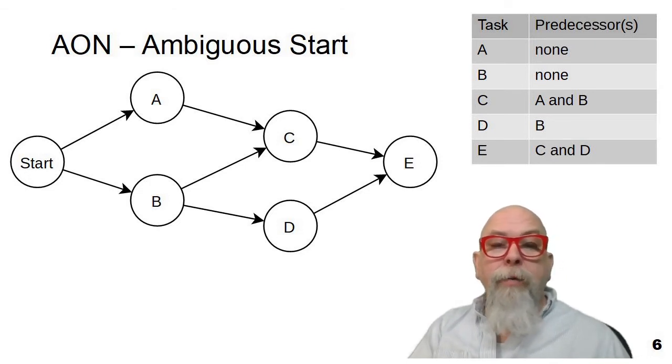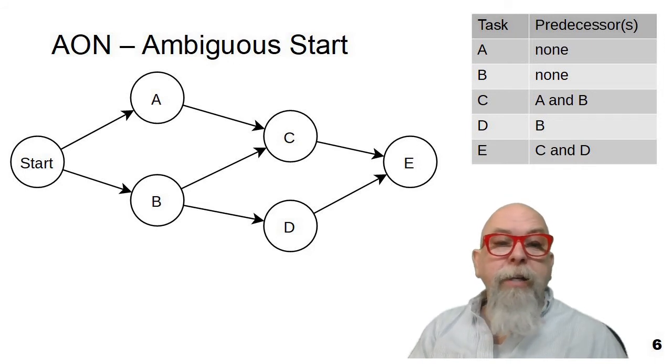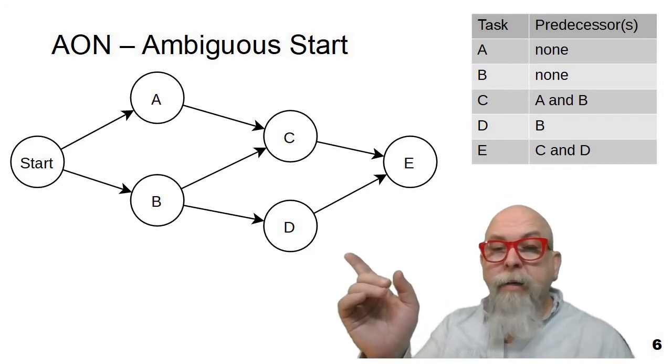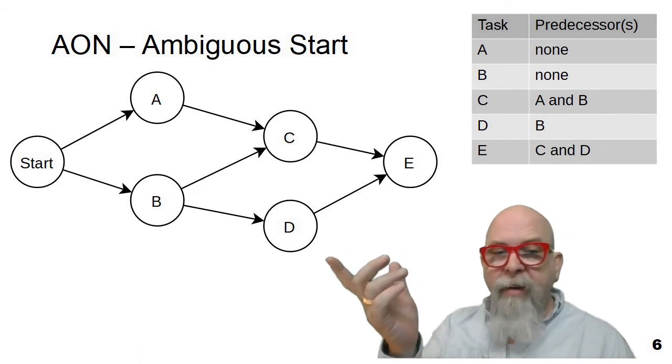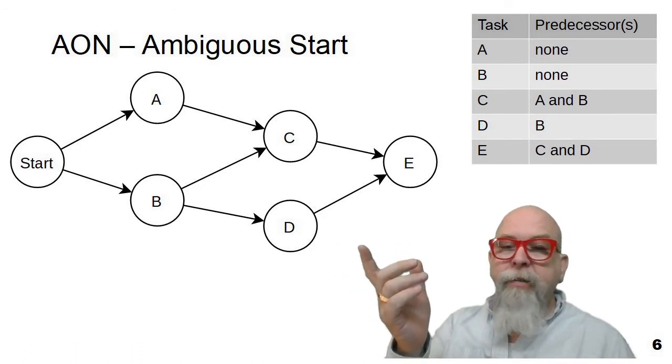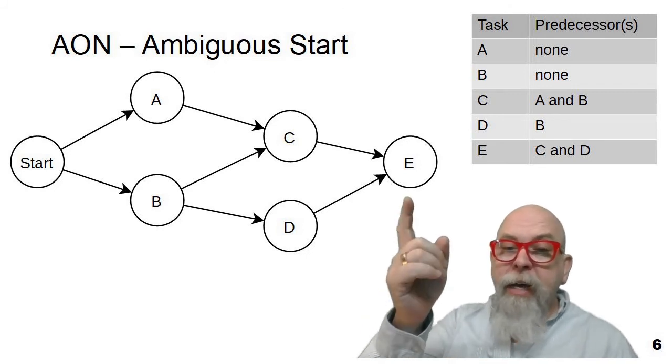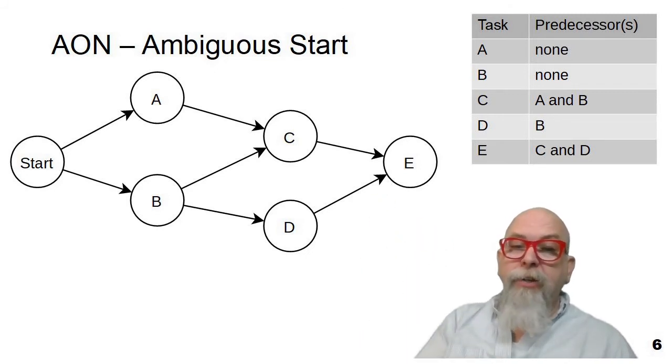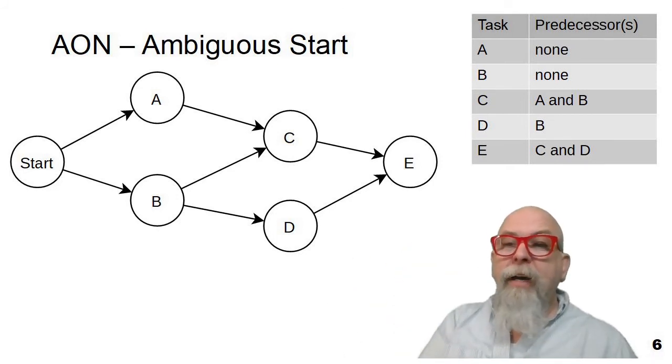Let's look that C has a prerequisite of A and B, and you can see that you've got to finish A and B to be able to get to C. You see that D has a prerequisite of B, so we don't even have to have started A. We could do B, D first before we jump up to A, C if we wanted. But you can't start C until both A and B are finished, and you can't start E until C and D are finished. So E is dependent upon literally all of the tasks, because C is dependent upon A and B, D is dependent upon B, and E is dependent upon C and D. And you can see how that works in this activity on node network diagram with an ambiguous start.